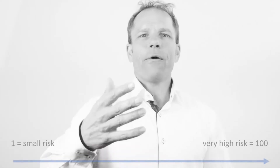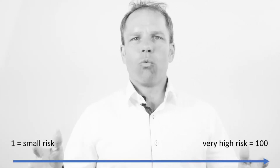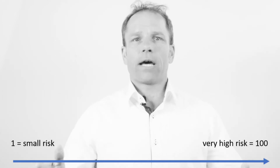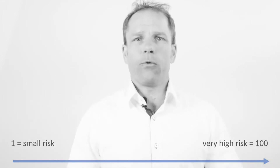Afterwards we quantified our study risk, which means we created a risk factor based on the impact that an uncertain issue might have, the likelihood that the uncertain issue occurs, and the detectability of this issue. In our example we used a range of 1, meaning an extremely small risk, up to 100, which would mean a very high risk. So, what next?